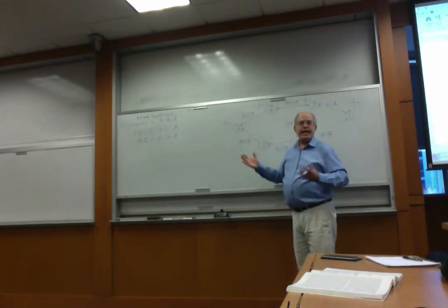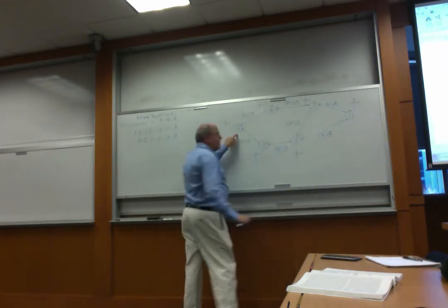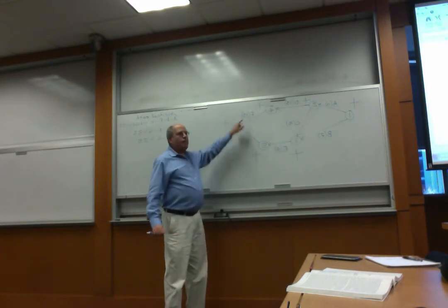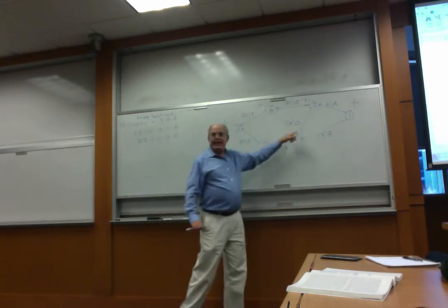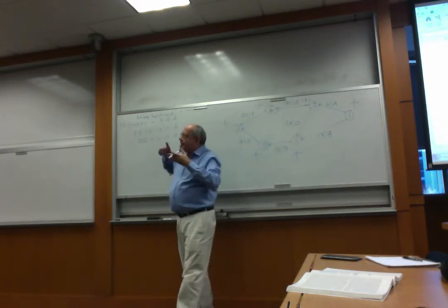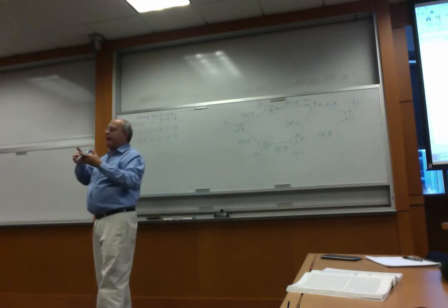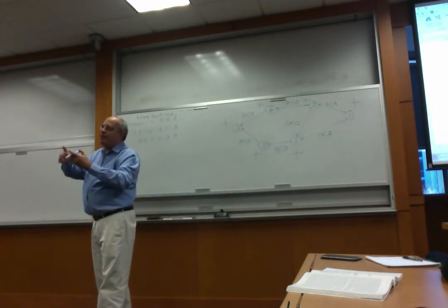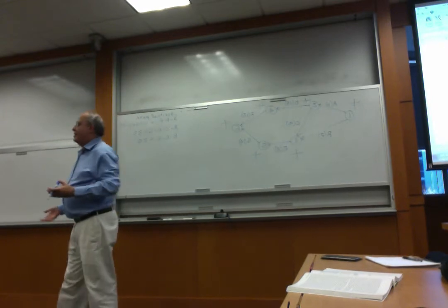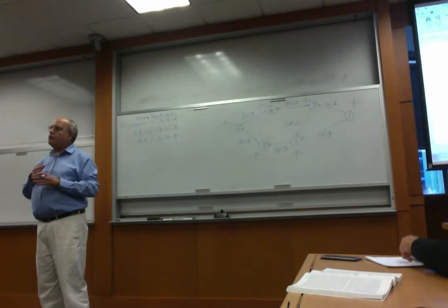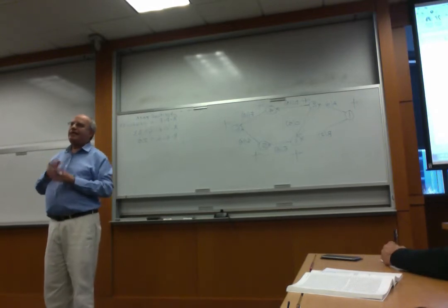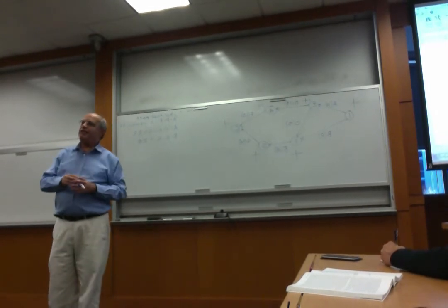And when can we say the whole thing is done? The whole thing is done when both F and G are completed. When both F and G are finished, the whole project is done. But you have to understand the arrows. The arrows tell us that certain activities must be completed before other activities start. What is the mathematical term for this? Precedence relations. We call those precedence relations. Certain activities must precede other activities.